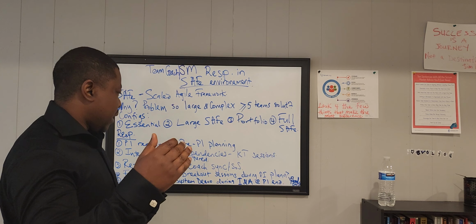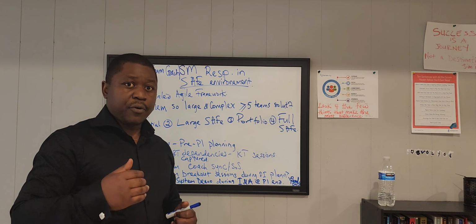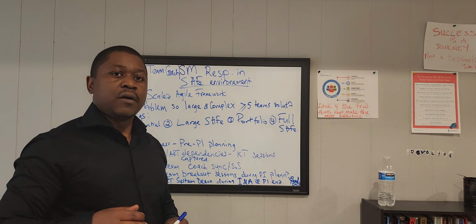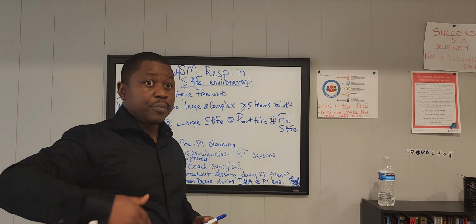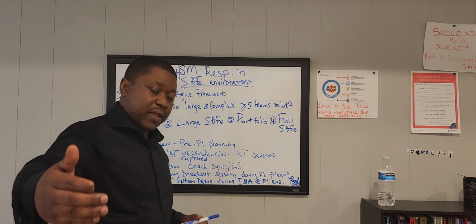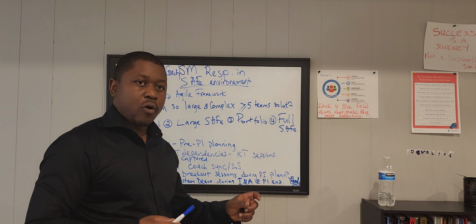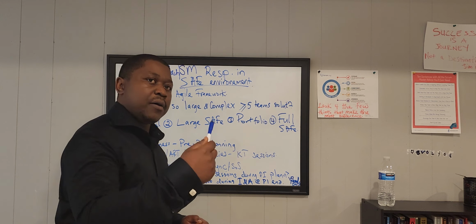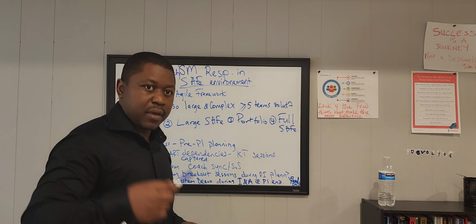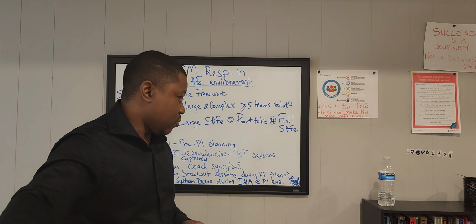So I make sure that before PI planning, I'm already reaching out to the Scrum Master or Scrum Masters of those teams that we will be relying on and giving them a heads up that, hey, we're going to be depending on your team to finish this piece of work so that we can pick it up and carry out our own work, maybe in the 2nd or 3rd iteration.